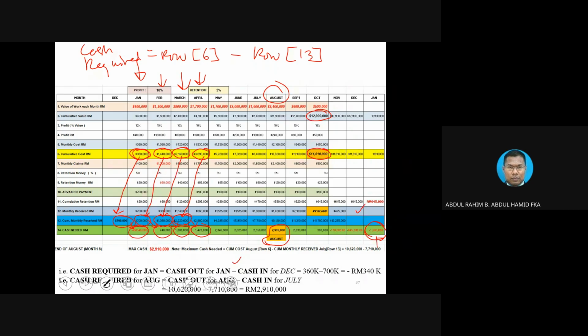You see, in the accounting system, it will close. And how do I get 1200? After 645, I need to add back with another 645, but it is in negative form because it is excess money. Then I get the whole profit. So this basically complies with this formula, equivalent to P, again and again. All right, so that will be